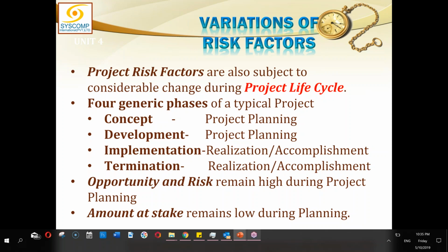Opportunity and threat both remain high during the project planning. As I said earlier, in the beginning, the risk is high. No matter whether it is opportunity or threat, they are high because the uncertainty is very high. And the amount at stake remains low during planning because we don't know much about the details of each risk, and as and when those details become available, we will be more sure about exactly how much is at stake.